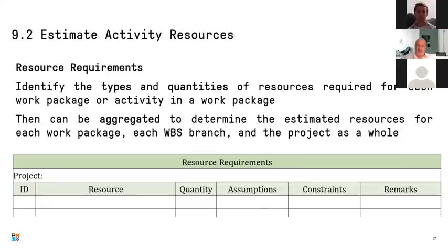Assumptions are very important, and from the first process, develop project charter, one of the outputs is the assumption log. It is important because it is the main source for risk. So if we are going to identify a risk, if you open your assumption log and any other assumptions that you have made in this project, you will really know what risks you are facing.